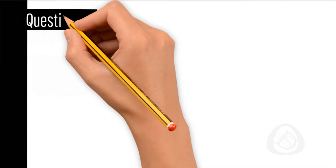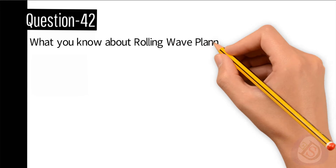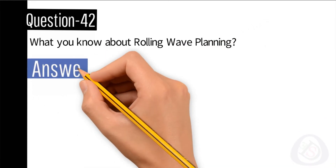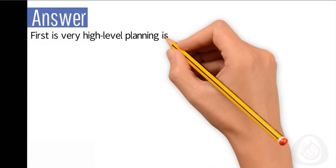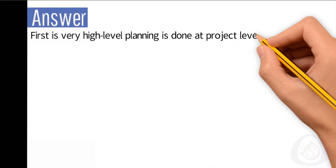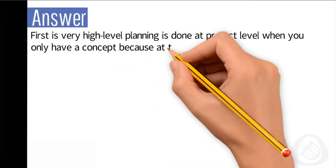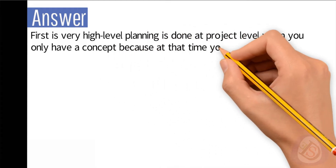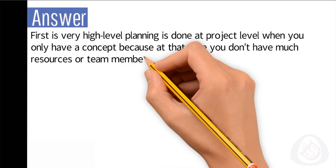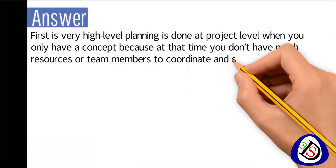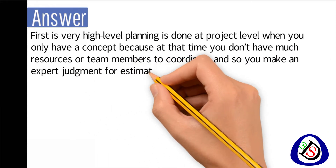Question number 42: What do you know about rolling wave planning? First, very high level planning is done at the project level. Initially you only have a concept because at that time you don't have many resources or team members to coordinate, so you make an expert judgment for estimations.